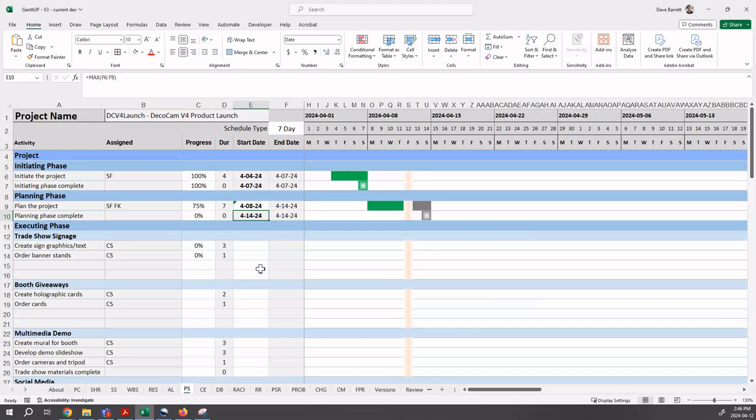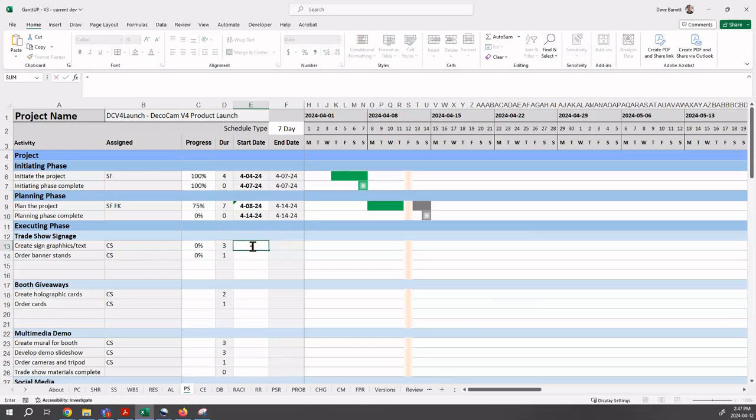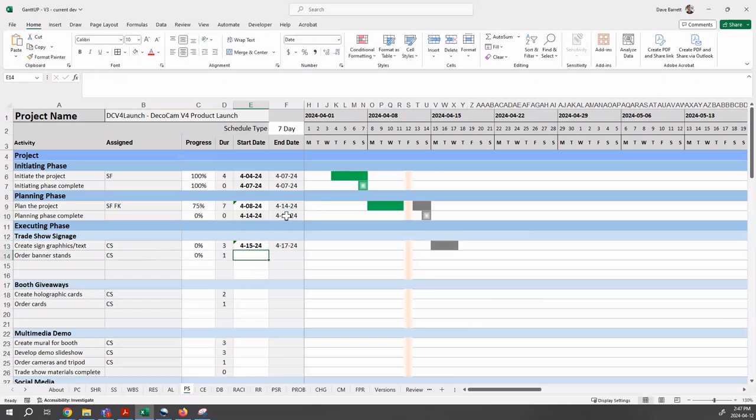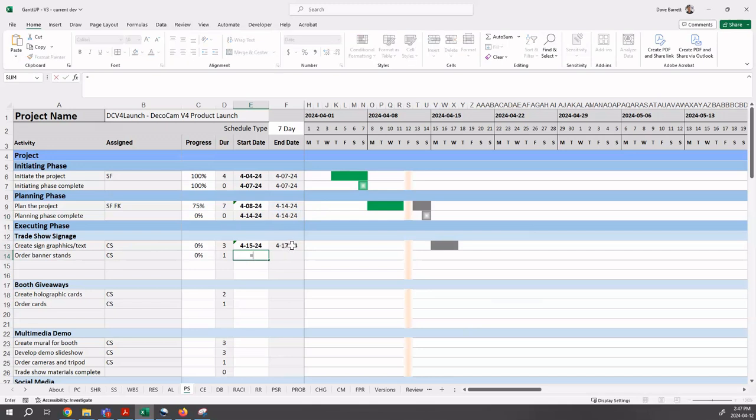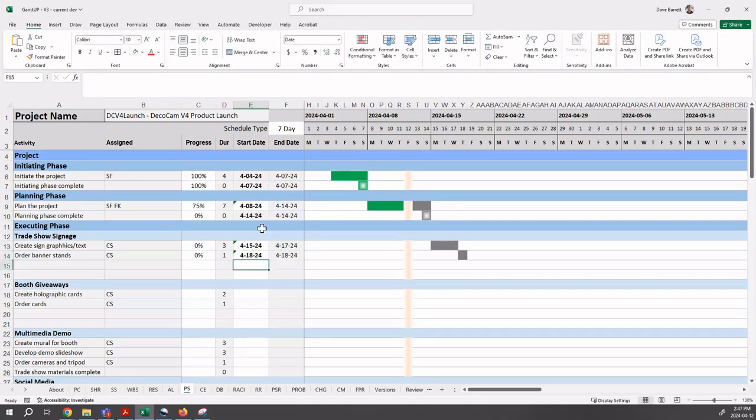If we want it to occur the next day after the end date, we indicate plus one. Watch what happens now with the Gantt chart bar. I press enter and it automatically schedules it to occur there. We can do that for each of these activities. We can say, okay, for this one, let's start it one day after the planning phase completes and we'll put equals, the date plus one.